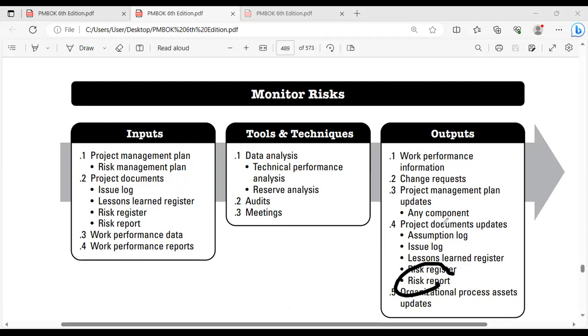And if you want to do any kind of course correction, you need to make sure that your project management plan is updated, especially if the methodology was not working, or during your audit findings you need to change your methodology to manage your risk properly. So your risk management plan should be updated. You can't update it directly because the risk management plan is integrated with the project management plan. Put in your change request, use your corrective actions, get your request approved, and then do the course correction. Maintain the old risk management plan for its integrity, take a new version of the risk management plan, and communicate with all the people working on the project, right?